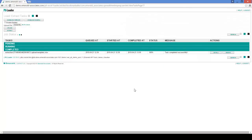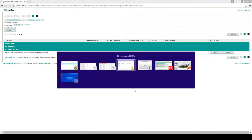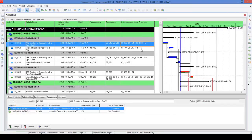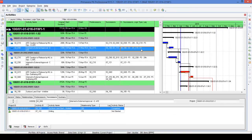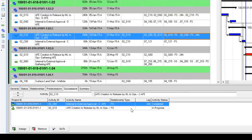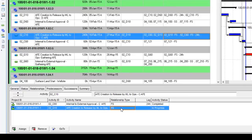Now let's go back to Primavera. It's blank — I'm just going to hit refresh. And as you can see, all the information has been brought into Primavera. We can check some of them, like this one here: it has a lag of 24 hours and a Finish-to-Start relationship with activity O2C60, and also another relationship with activity O2G10.